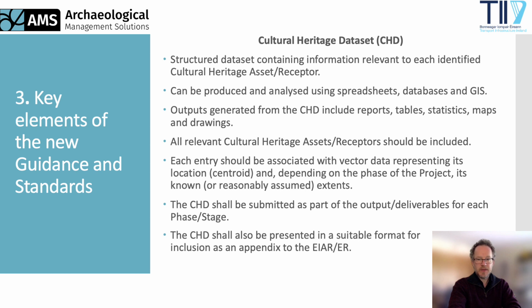All relevant cultural heritage assets should be included in the CHD, whether archaeological, built heritage, or other cultural heritage. Each entry should be associated with vector data, representing its location, and depending on the phase of the project, its known or reasonably assumed extents. The CHD is critical to the efficient assessment and mitigation of impacts, and will be submitted as part of the outputs for each phase or stage.